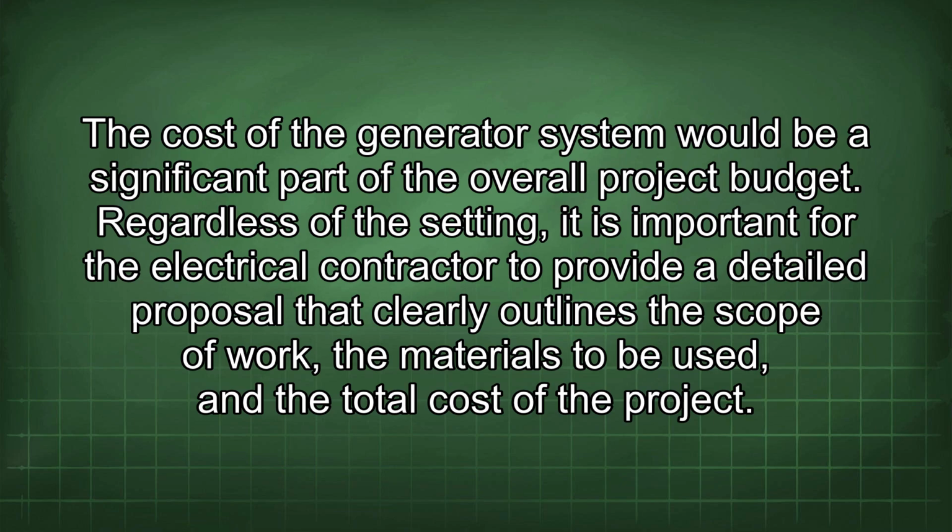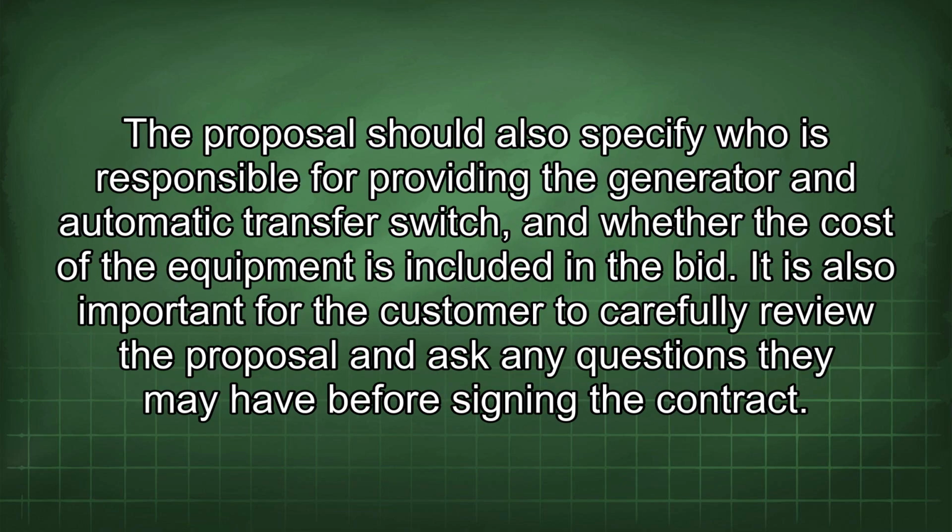Regardless of the setting, it is important for the electrical contractor to provide a detailed proposal that clearly outlines the scope of work, the materials to be used, and the total cost of the project. The proposal should also specify who is responsible for providing the generator and automatic transfer switch, and whether the cost of the equipment is included in the bid.